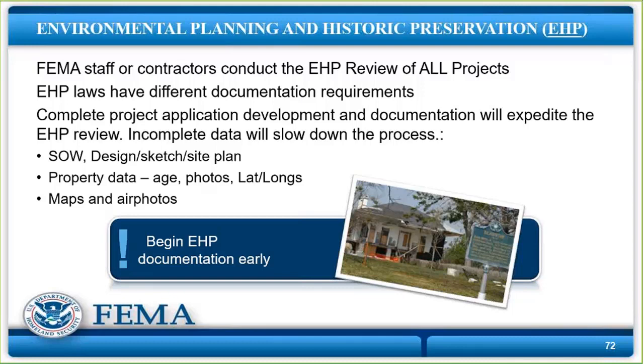But you know what? You can include in your project budget to hire a contractor to work with FEMA to prepare the environmental assessment if one's required. And it will be required for any in-water work, period. Know that in advance. Our environmental staff will work with you, and they will definitely work with a contractor, and they will oversee what the contractor is doing and make sure it meets FEMA standards and all that. But nonetheless, somebody else doing that work that they then review and bless off on is a lot easier than them doing the work or us hiring it out.